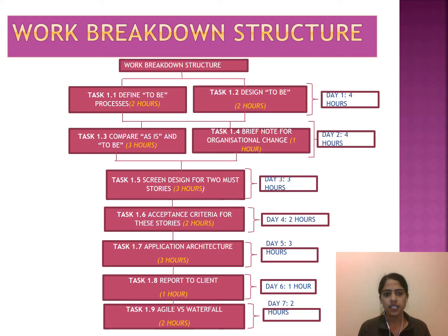To start with the development of the new system, first of all, the work breakdown structure is the initial part to break our work into modules or tasks so that we can estimate the required time to finish those tasks, as in this diagram. I define all the tasks and the estimated time to fulfill those tasks.